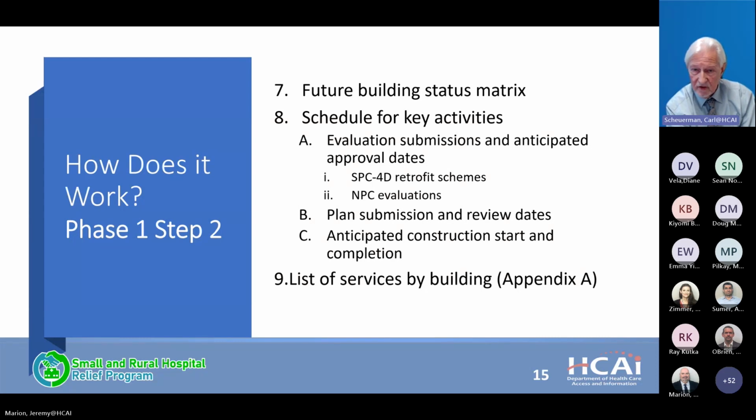When the evaluations are due, we're looking for planned submission and review dates once all of those evaluations have taken place. And we're also looking for the anticipated construction start date and a completion date, with the understanding that all work must be completed by January 1st of 2030.